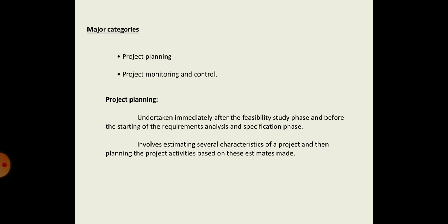Project planning is undertaken immediately after the feasibility study and before gathering the requirements. It should be carried out even before starting the requirements analysis and specification phase. And the initial project plans need to be revised from time to time as the project progresses and more project data become available.